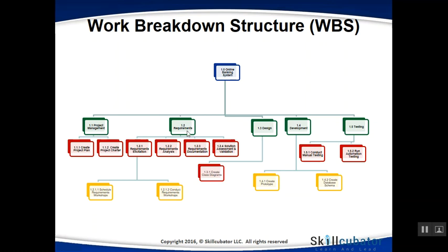Under the requirements, these are sort of my work packages, right? The amount of work I need to do in order to complete my requirements. Same thing here, testing. I'll be doing manual testing, I'll be doing some automation testing. So the same testing function or activity has been decomposed into two different sub-activities, so to speak. Right? So the concept is similar, but here we are more concerned with the activities we are doing as part of the project.